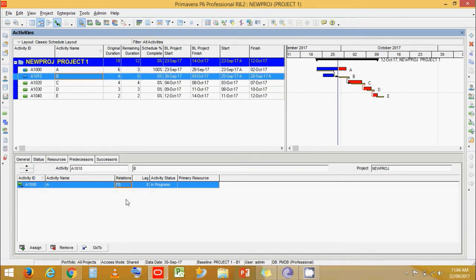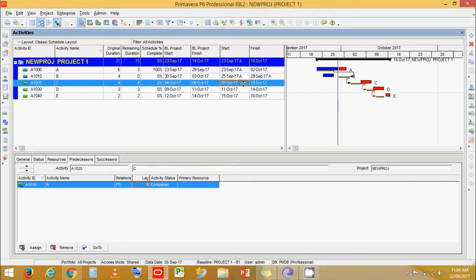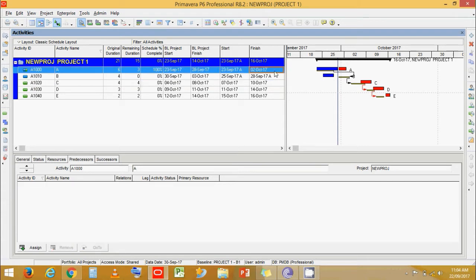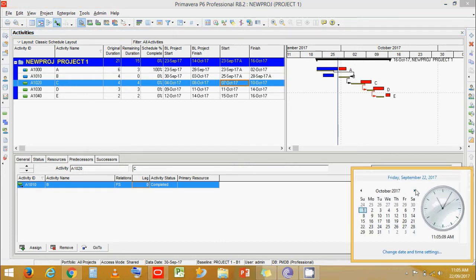That is why activity C's start is on 7th October. The relationship works not only in Finish-to-Start but also in Finish-to-Finish. Three days after 2nd October should be the 5th, but it starts on 7th October because, looking at the calendar, the 6th is a weekend — that is why activity C starts on the 7th.